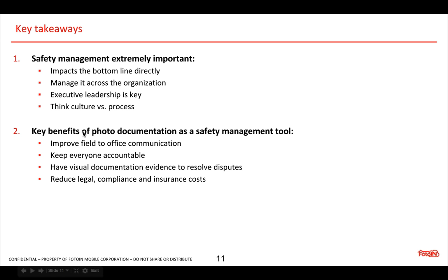And if you have all that well organized and well put together photo documentation, you'll be able to resolve disputes either during the project or after the project, or anything that might end up going into the legal realm or the insurance realm. And if you're resolving it more effectively and sooner, obviously related costs are reduced.